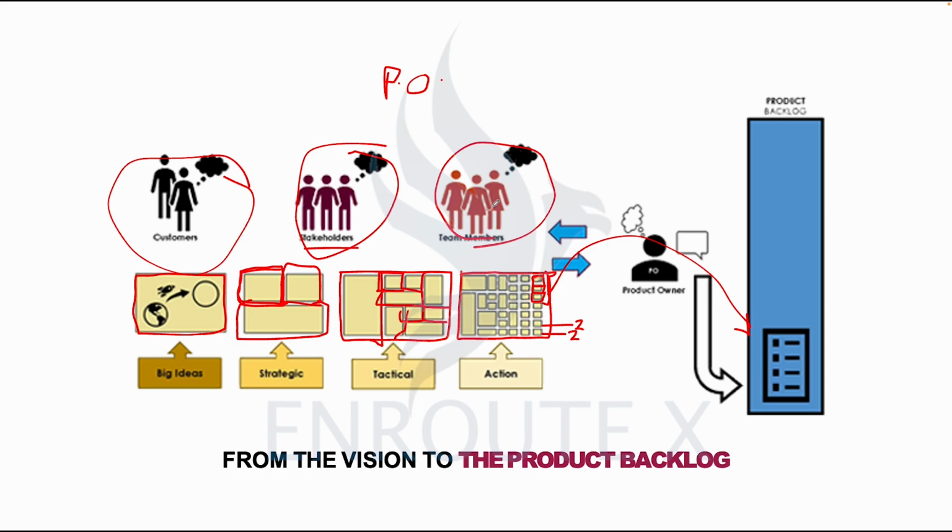Mind you, a Scrum team is between 5 to 9, so you could actually have 3 developers plus the product owner and the Scrum master. So let's say a team of 3 developers has capacity to work on, let's say, 12 stories per 2-week sprint.